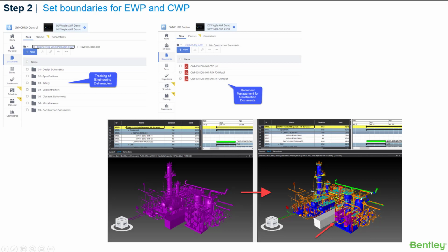CWPs are created by the project and construction management team in collaboration with the project owner in accordance with the established POC. CWPs are the backbone of construction projects. They are the foundation from which all construction activities are executed. CWPs should be discipline specific and facilitate early construction planning and logistic decision making. They are used to build IWPs that construction crews will use in the field.